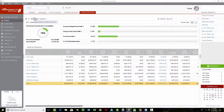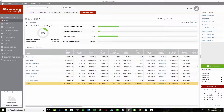At the top of the WIP report, there are dashboard elements that give you a bird's eye company-wide view of how you're doing profit-wise. According to this example, our gross profit is a little over 21%. If our target is 20%, we're doing pretty well. However, it looks like our current numbers are actually closer to about 19.5%, meaning we're missing our target by about a point and a half — almost two points. That 2% represents a pretty significant dollar amount, especially when you look at total remaining in production.